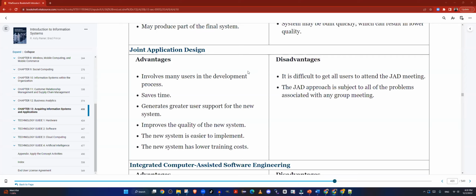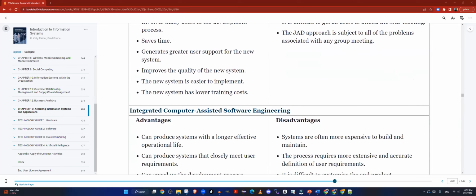Sometimes their team members, like from the client's organization, will come and have meetings with you while the product is getting developed. Or in the initial phase, you will have a proper JAD room. There's actual proper setup for a JAD room, and there are certain limitations as to who speaks and what, and mediators and proper setup and scribes. There are a lot of details in that process, but the whole idea is the client is constantly involved in the project. So if you are off track, or if you're doing something that you shouldn't be doing, it could be caught right away. So that's the JAD approach, a little bit more expensive and time consuming.